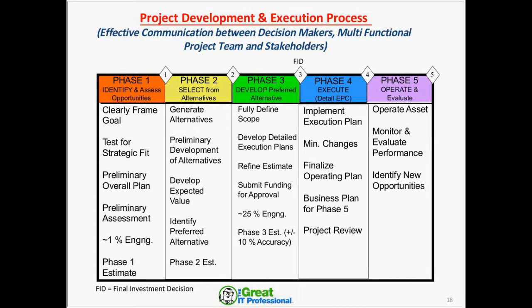This is Diamond 1, and that's kind of a gate where you meet with your sponsor and you decide whether there is a viable business case to proceed forward. And if so, you move into phase 2.